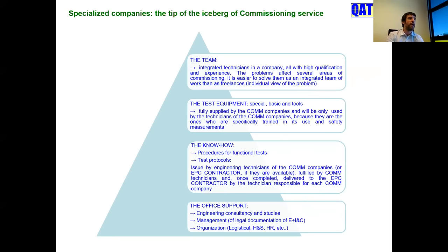So the team has to use test equipment. In Cátro, for instance, because it's my experience, we have 12 years putting service power plants all around the world, not only CSP, even coal plants, even combined cycles in biomass. The test equipment to face the commissioning of a CSP entails about 300,000 euros per plant. That is the value of replacing the test equipment.